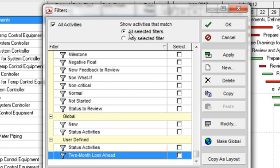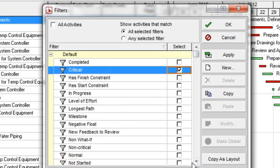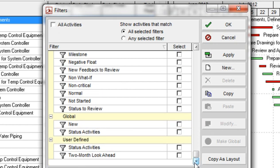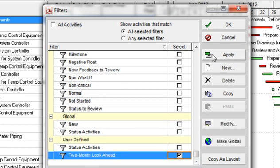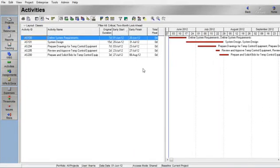If you were to select the Any Selected Filter radio button, you would create an either/or for all selected filters, meaning that all activities that are critical or that start within the next two months are selected. So we want to click the radio button All Selected Filters. Select both the Critical filter and the Two Month Look Ahead filter, click on Apply, then OK. You have now selected those activities that are critical and that start within the next two months — only those activities.